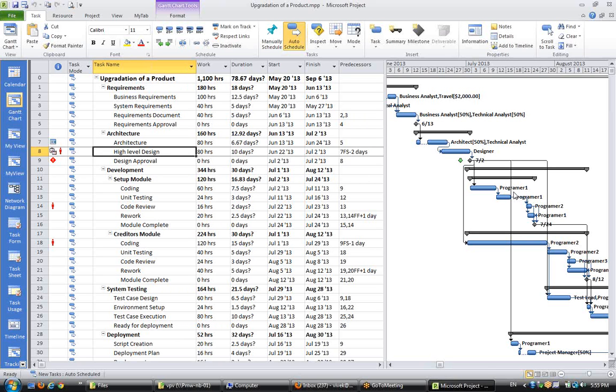In percentage complete, accuracy is low. The duration method, the accuracy is better. In the efforts, the accuracy is even better. And with the timesheet type of data, each and every day what people have done on this project, the accuracy level is very, very high.